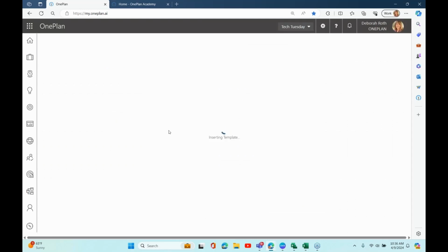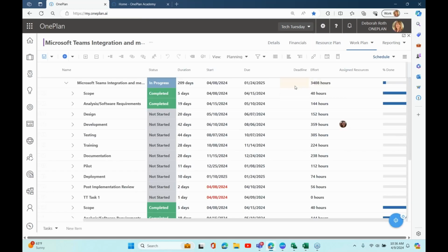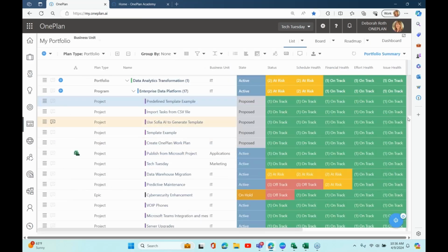this plan. Now this one is going to duplicate the tasks, but what that does for you is it makes it much easier to continue to use project planning schedules that you prefer, and then be able to build on them. The one thing that's important to note for all of this is that when you do these imports, you would need to redo the dependencies. But otherwise, you've got the structure and everything here. I'm going to speed this up.